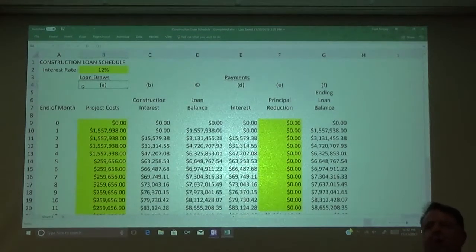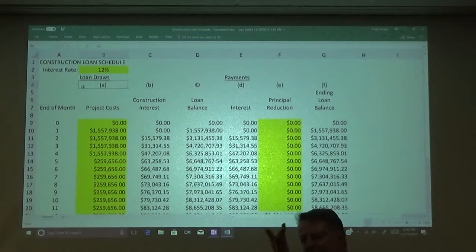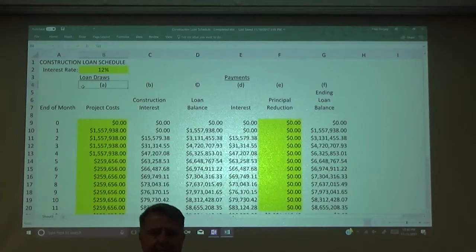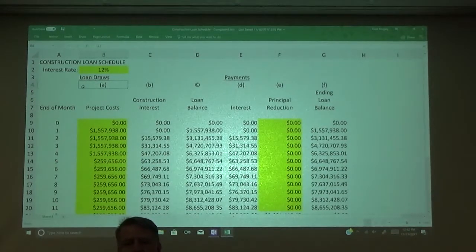So there's an added cost, if you will, in terms of that kind of inspection process that the construction lender engages in on a regular continuous basis, to make sure that, okay, you just submitted a $50,000 bill for a slab to be poured, and they got to the site, there is no slab. Well, then they're going to be like, okay, what happened here? And want to investigate that and potentially, obviously, not make any payment. Okay, does that make sense?